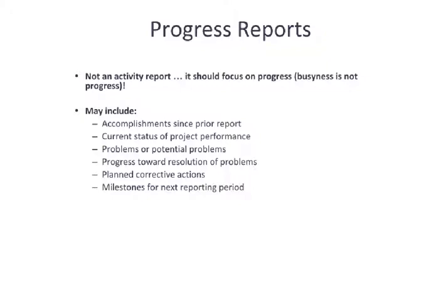Any problems or potential problems need to be documented, but I would like to warn you that these need to be actual problems. It is not a problem to say, well, we're running behind on this. Okay, so you're running behind on a particular project or task. That needs to be addressed, but that's not a problem that your manager needs to help you address necessarily. That's just you running behind. That happens on every program. So you as the project manager or the sub lead on that task need to address that, but it doesn't necessarily need to be reported up to the person above you.